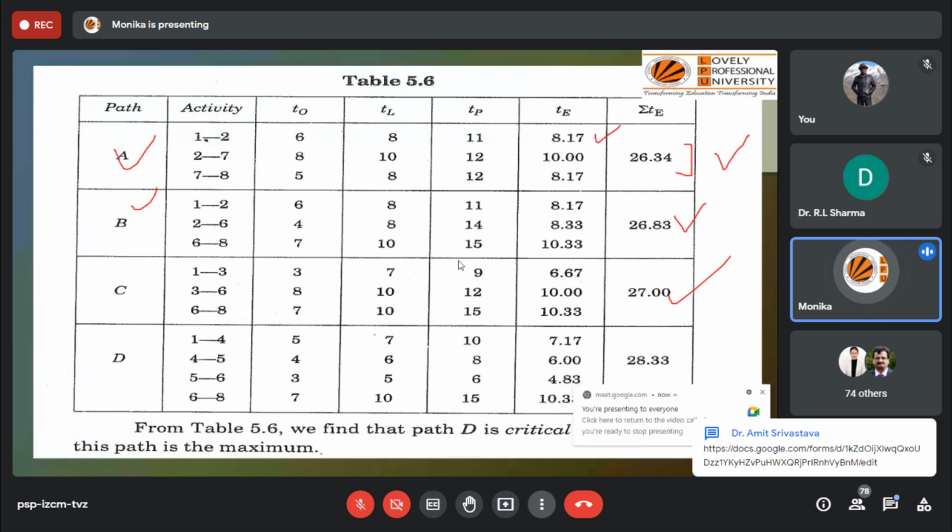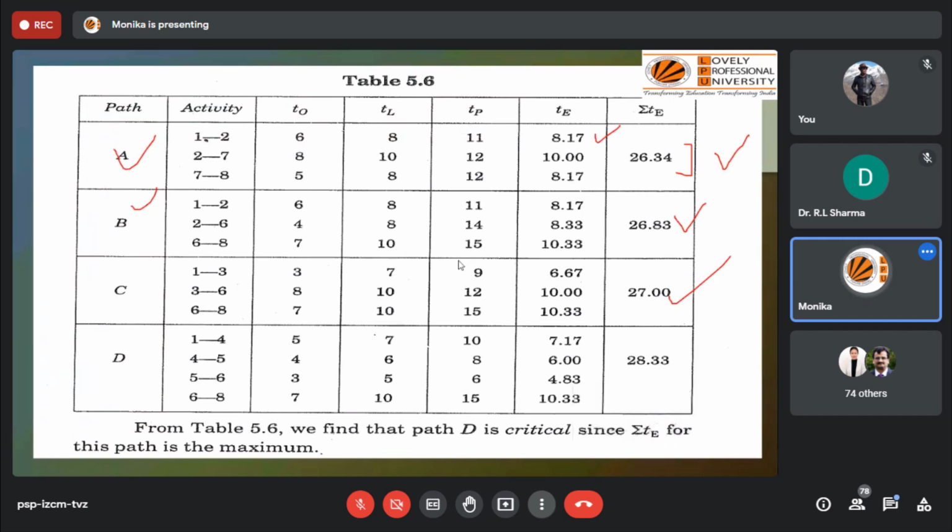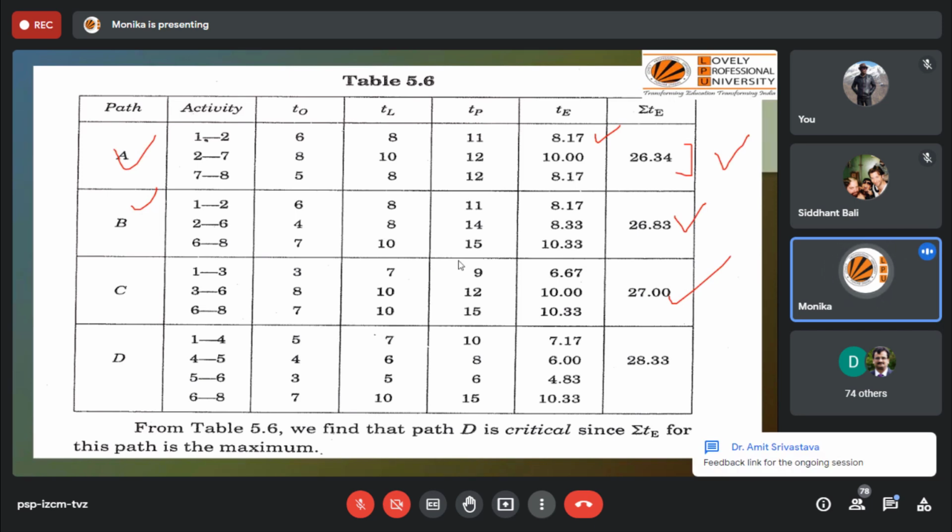Despite 9th May, let us consider that we have room to delay our activity, how much can we delay it? Let us consider that for some reason we are not able to start on 10th May. Is it possible that we can start the activity on 12th May or 15th May? We have that much time without affecting the total project duration. That we need to consider.